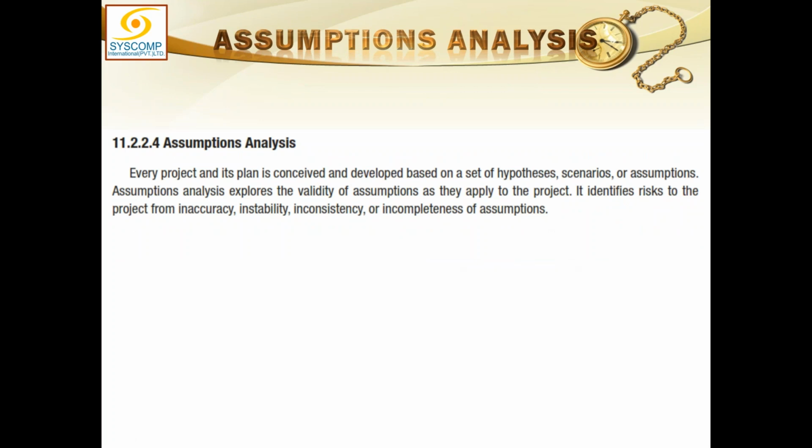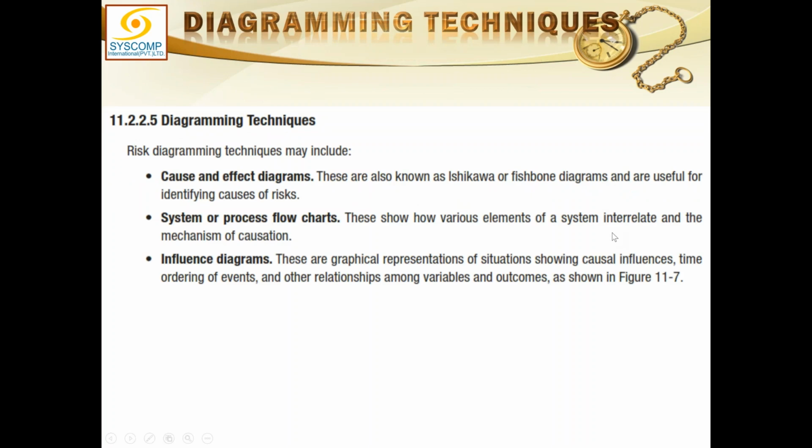Assumptions, as I have explained earlier, every project and its plan is conceived and developed based on a set of hypotheses, scenarios, or assumptions. Assumptions analysis explores the validity of assumptions as they apply to the project. It identifies risks to the project from inaccuracy, instability, inconsistency, and incompleteness of the assumptions. Analyze each one of the assumptions for these flaws, and maybe we can improve the assumptions, maybe we can identify certain risks out of it. So this could be a tool for risk identification.